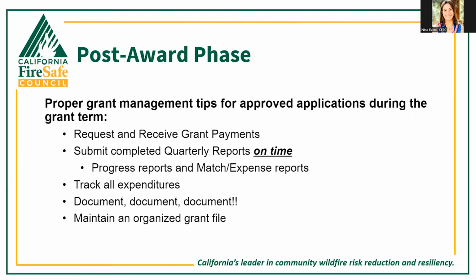Quarterly reporting is also a requirement of this grant. You will report on the progress of your grant project, comparing your actual accomplishments to the projections you identified in your work plan. You will also provide a brief narrative description of your project, noting any successes, setbacks, and any changes that you worked on with your grant specialist. You will also report on the grant budget and provide a complete accounting of all expenditures over the course of the grant. All data reported in these progress reports must be true and accurate.